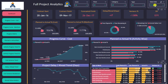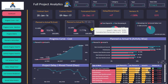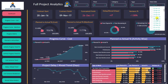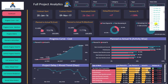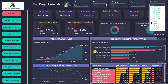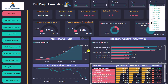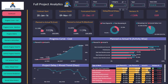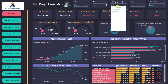Additional information includes planned cost, the exact figure of earned value cost, cost variance, and remaining cost. Not only that, but I can go back to any data date of my choice and carry out the same level of analysis. For example, I can go back and everything will change, showing the progress status at that point with one click.